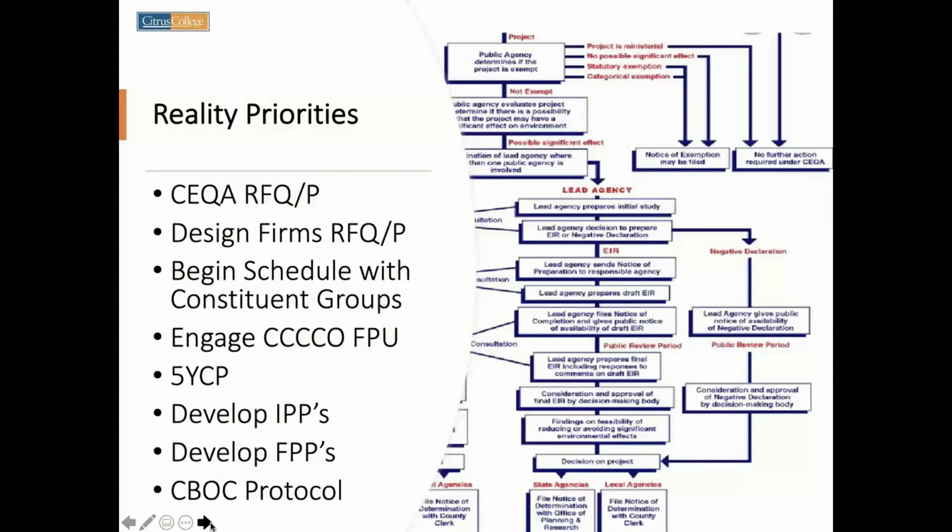And basically an IPP is segregated by project. So on our EFMP, there are 6 major projects that we want to undertake. There is one other building that we do want to undertake, and then there's a series of smaller projects. But out of the 6, we know that we're not going to be able to get all 6 of them done because there's simply not enough money. So we went ahead and developed 5 IPPs for the top 5 categories. All of those are ones that have a high priority and a high probability of actually being funded. So 5 IPPs were developed.